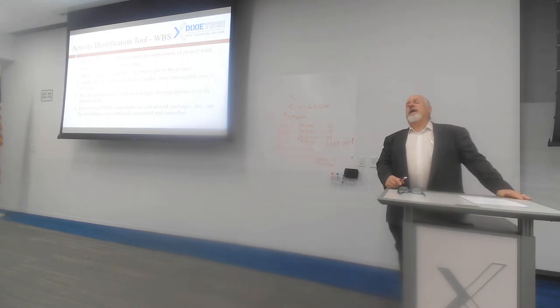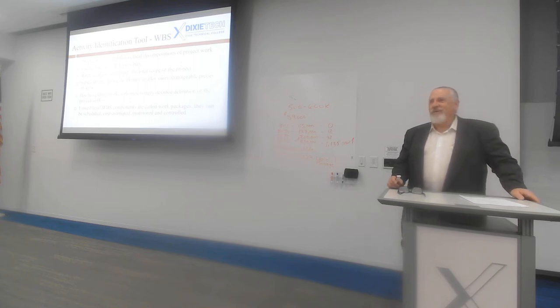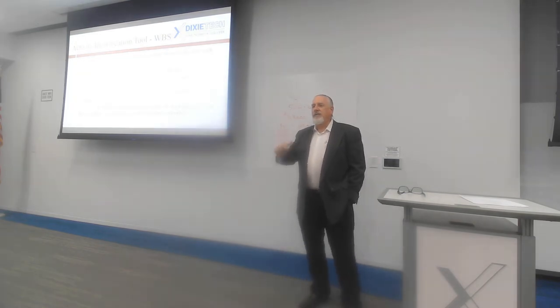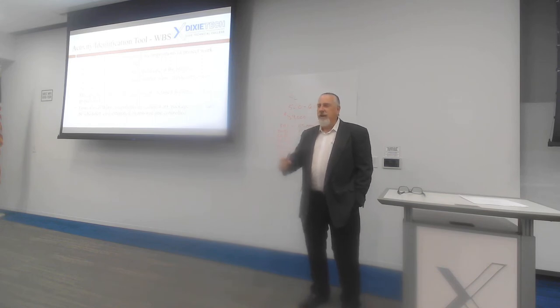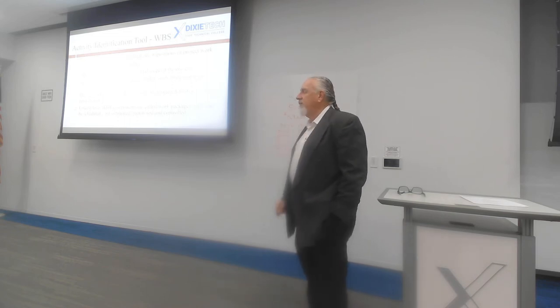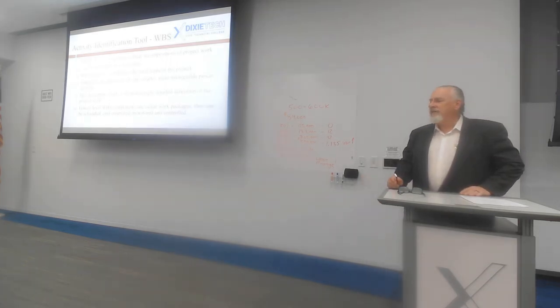When somebody sits back and they go, well, that thing will take us 3 months, I'll bet against that. You've got to be wrong. That's 90 days. That's how many hours? You're off one way or the other. It's going to take longer than that, or you're going to come in quicker than that. That was an estimate. That was a guess. Now, if I do all the work and I add it all up and say, I got 90.1 days to do this, I'm going, okay, let's make that 90. We're going to make up that 0.1 somewhere, right? And so now you're driving facts instead of guessing. And I don't want guesses, so we do a work breakdown structure in the finest sense so that we can agree with their estimates.